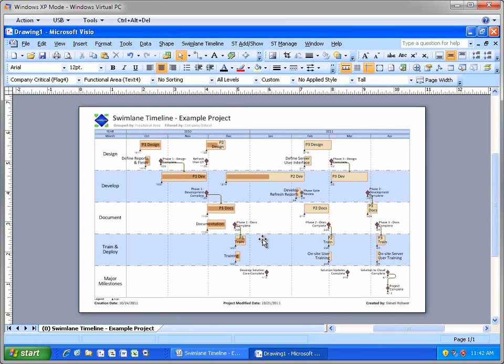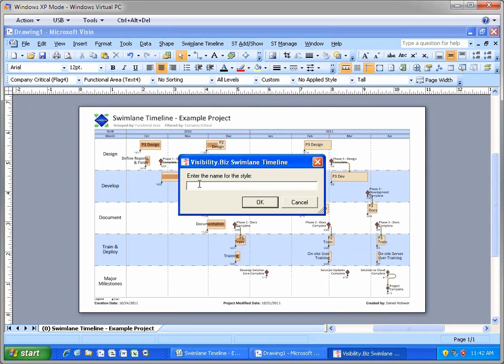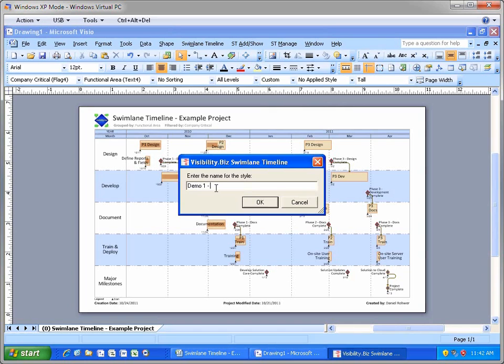Now, if this were a Swimlane Timeline view that I wanted to reapply to other projects, I can quickly create a reusable one-click style. From the Swimlane Timeline Manage menu, I'll choose Named Styles and Save and then enter the style name of Demo 1 Single Project.